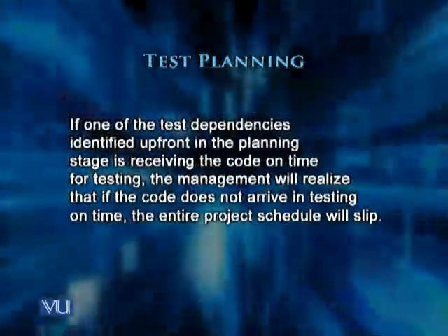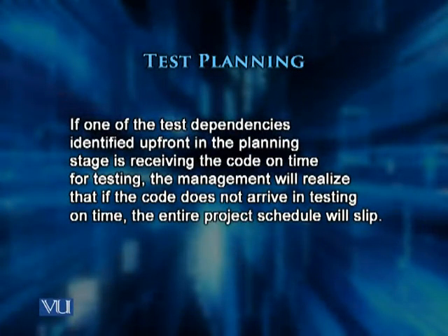If one of the test dependencies identified up front in the planning stage is receiving code on time from the development team, then the management will realize that unless the test team gets the software on time, they will not be able to complete their testing activity within the requested time.